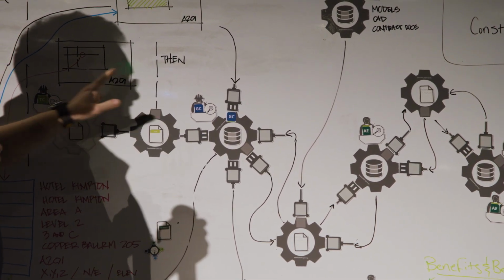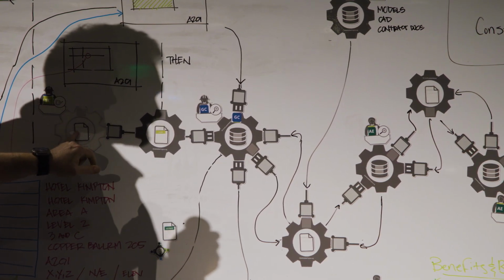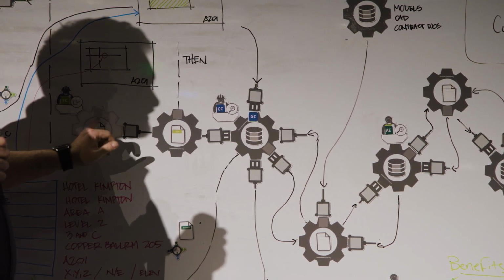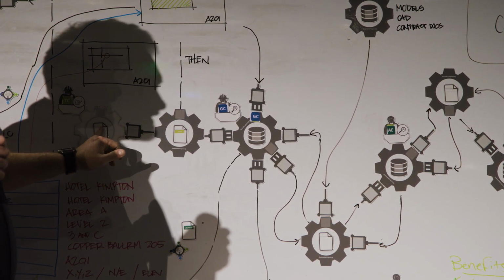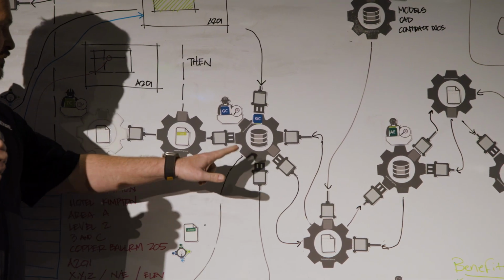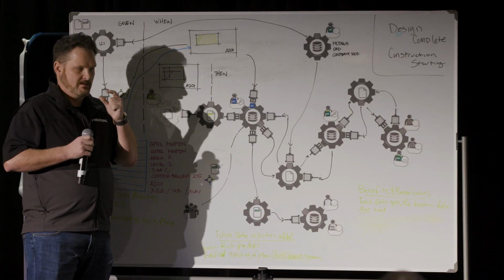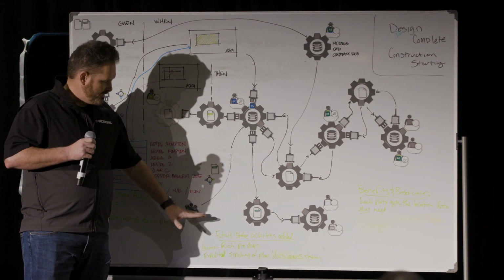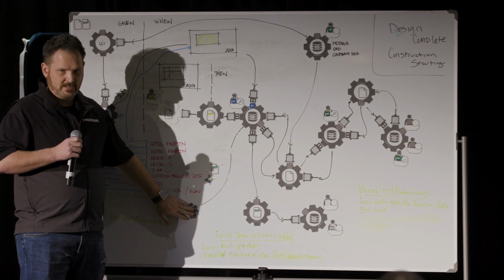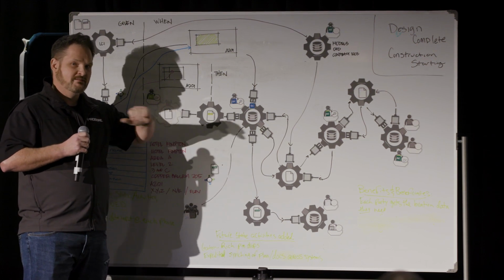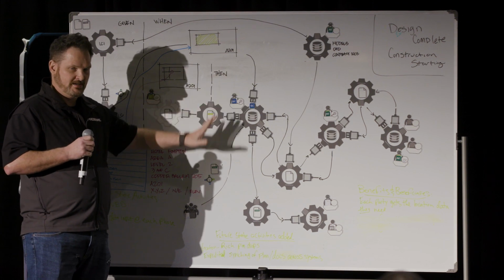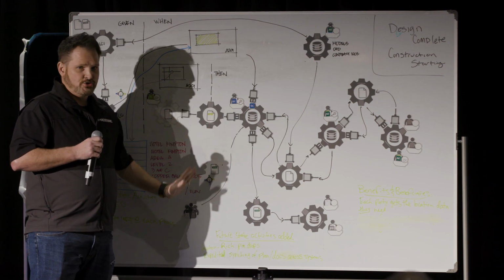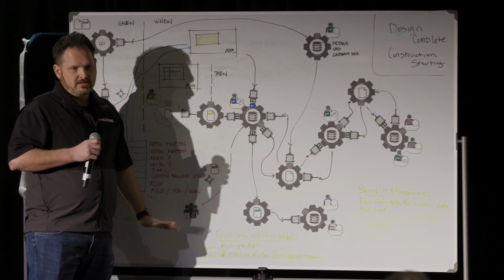When that doesn't happen, the first RFI without location information could turn into 10 RFIs for the same thing, because you're not seeing what the impact is. There's so much information overload on projects, so what we're trying to do is filter this list. When the RFI goes out to everybody, we're telling you, you may want to look at this because it's affecting these sheets. Everyone's still getting the data, but now we're helping notify you: these are your sheets, these are part of your scope. You might want to look at these.